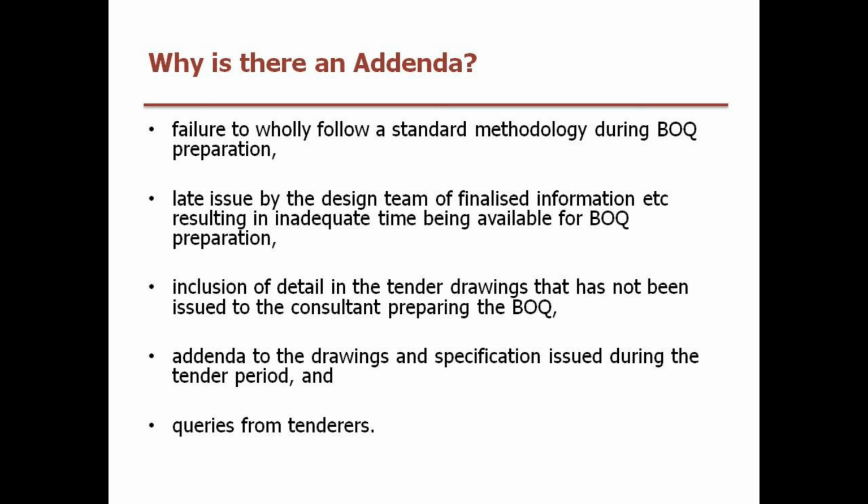But more than likely, they're often queries from builders themselves that have found discrepancies in the bill of quantities or in other documents that then should be included in the bill, or also consultants that have not been able to issue changes to documentation while the quantity surveyor or cost engineer has been preparing the bill of quantities for tender.